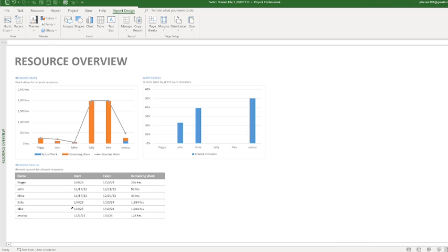You can do an over encompassing, which we can do that. And in best practice, you break it down by month. Because if you do by year, it's not actually good practice, because that doesn't really tell me from a month to month basis how much I'm spending each month doing these overhead charges. Which again, they're not also on the critical path because they're just level of effort things that you have to do on a regular basis. But it does help from a cost perspective to understand how much you're spending on a project manager doing that and a PMO and so forth.